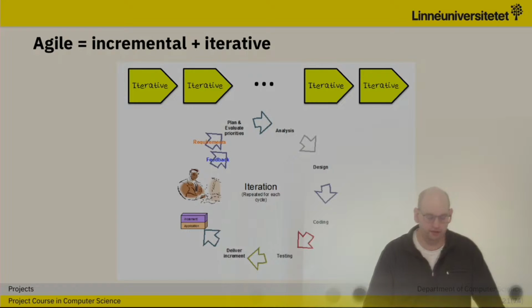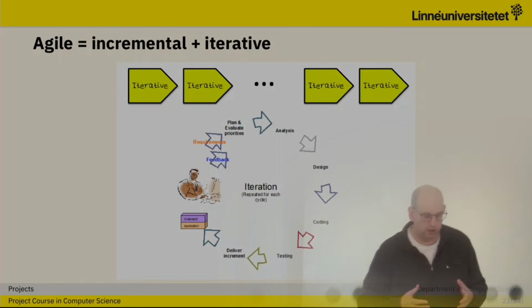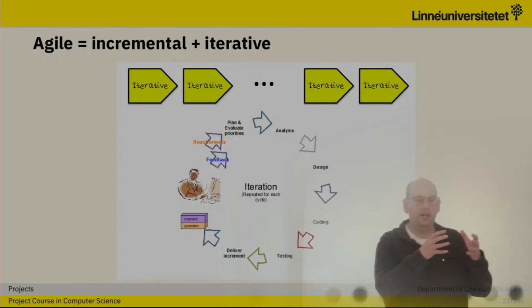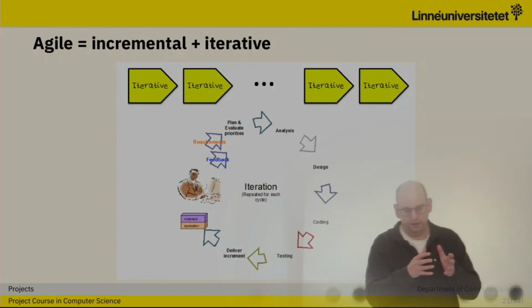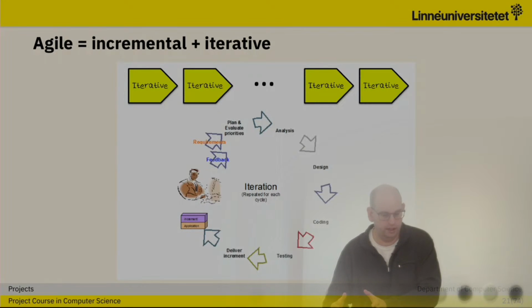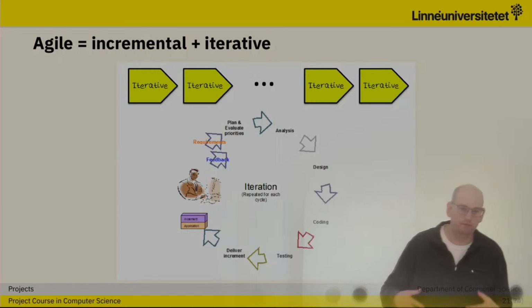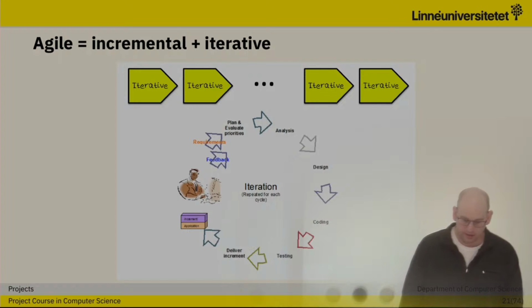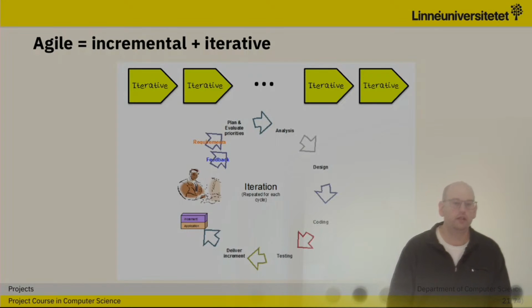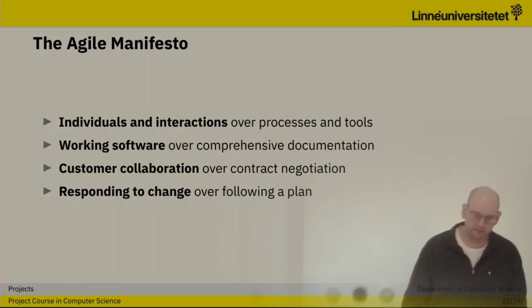The UP processes, for example, they have this mindset. However, they work with mostly analysis in the beginning, and then shifting over to mostly design and mostly implementation. And when you get to the testing phase, there should be very little of the analysis phase being done at that time. So the idea here is to actually basically see a project as a number of sub-projects with business values and hand them out.